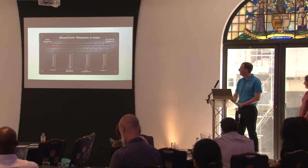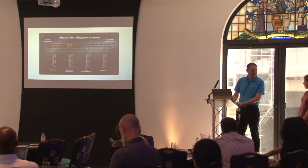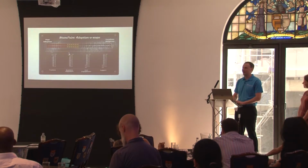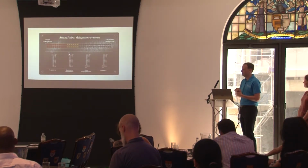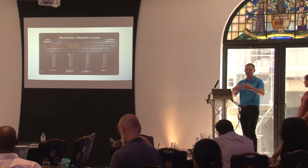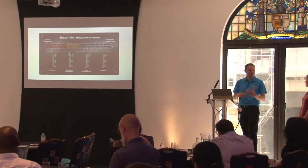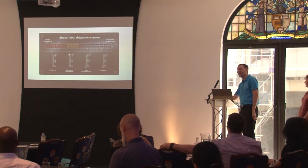Let's try again. So you knew the old problems that you had and were trying to avoid, and you knew what you were trying to do. And you talked to the business about that. And one of the things you said right at the start of the session was that if you talk to people closely involved with the first version of SharePoint rolling out, they'd all declared it a success. So the site owners at that local level thought it was great, but when you talk to the end users actually using it, they said, no, we don't use it, or we don't really trust it. We're going to put everything in SharePoint and on the X drive.